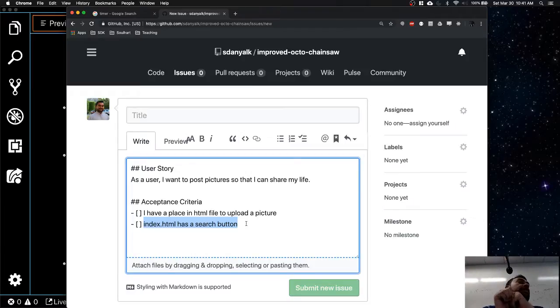So what is going to happen is, not every user story you are going to be working on, right? You have a team of 4 or 5 people, everybody is working on a different one. But as a team, you need to come to a conclusion that whoever is working on this user story, unless these things are done, this story cannot be considered as complete.